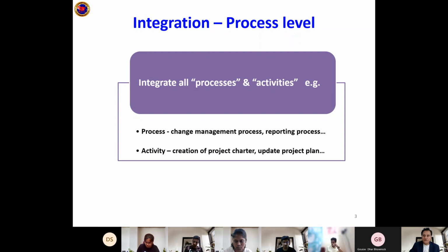There's a big document which is called project plan. Now, project plan essentially are 10 elements which we have learned. Each element there is a plan. Plan for integration, plan for cost management, your plan for time management, plan for quality management. So 10 such plan you stitch together, and that becomes a master plan which you will be preparing, and you are required to prepare in any project.